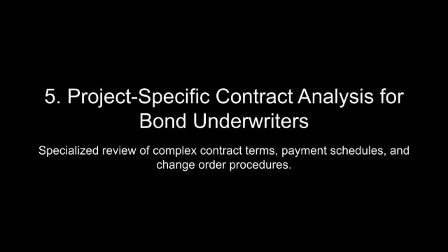losses. One illustrative example involves a project where the contractor implemented a series of verbal change orders without obtaining formal approval. When the project owner later disputed the validity of these changes, the lack of documentation resulted in costly litigation and a bond claim. Another case study involves a contractor who submitted change order requests well beyond the notification deadlines